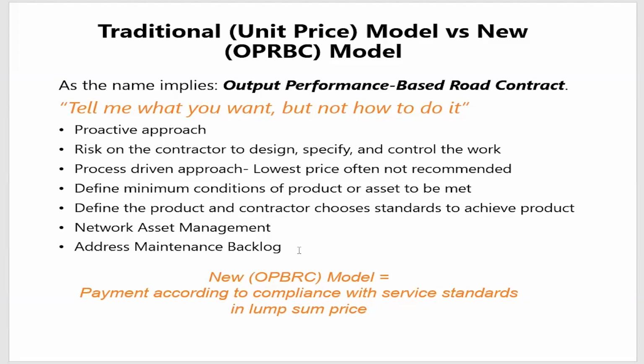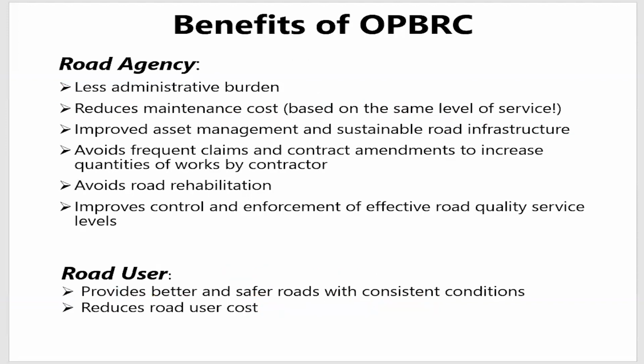Because invariably, in the traditional construction that we do, 2 years, 3 years, when the contractor finishes, he hands over to the employer who has a lot of backlog of maintenance. Then, as we can experience in Ghana now, the maintenance backlog. But in OPBRC, the contractor is responsible for the maintenance after the construction. So those are some of the things.